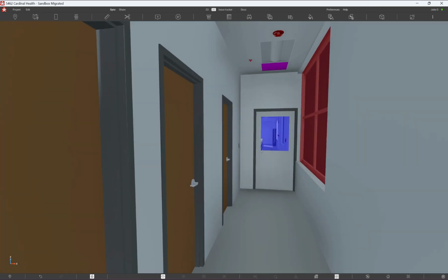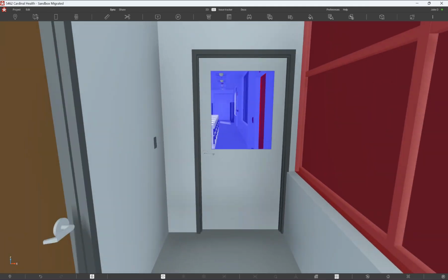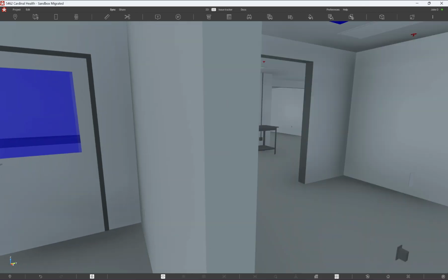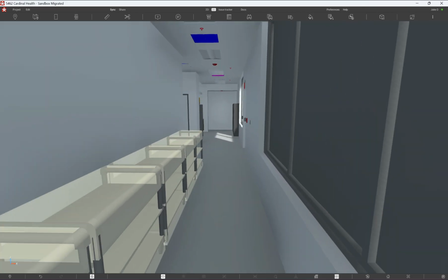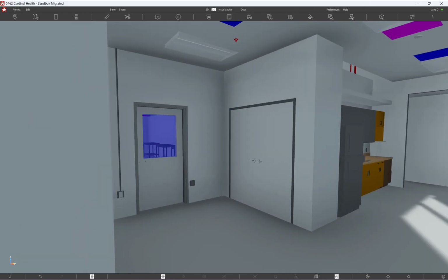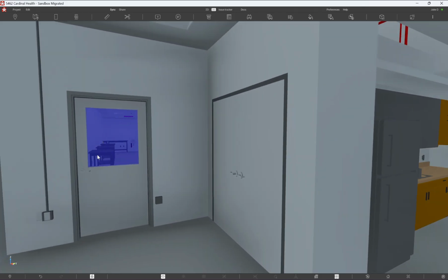This is great for QC walks. I've done a few of these. Anytime a new model is uploaded, it's very important you go ahead and jump down into a QC walk, and I just find it best to actually go inside the model, walk slow, and look through all of the rooms. And here I'll use multiple of the tools, including viewpoints, map, and rooms. I will get into that in a little bit.